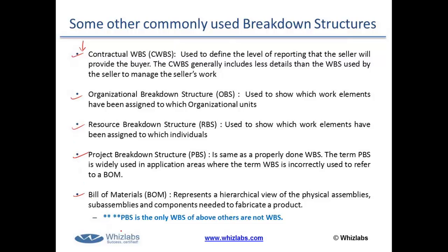But please remember, only the project breakdown structure is an example of WBS. The rest are examples of breakdown structure, but not work breakdown structure. I repeat, out of all the examples given here, only the PBS, project breakdown structure, is another name for work breakdown structure, but other breakdown structures are not WBS.